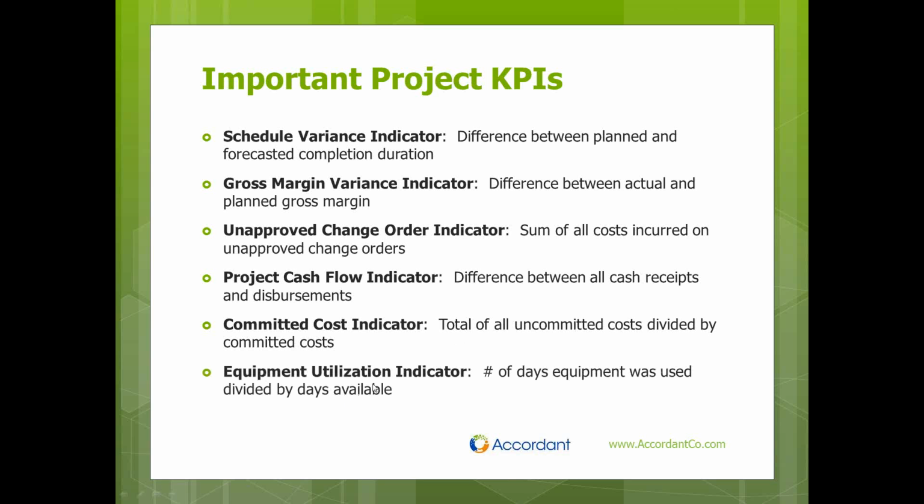And the last one I'm going to mention is equipment utilization. If you are a company that has a significant investment in heavy equipment, you might want to calculate the number of days equipment was used divided by the number of days available.